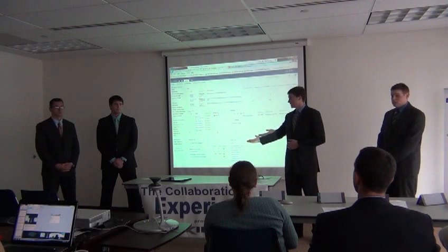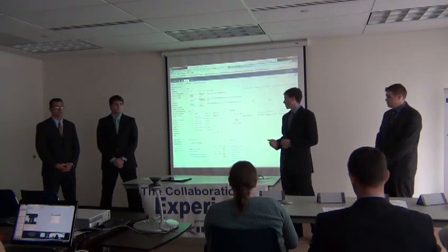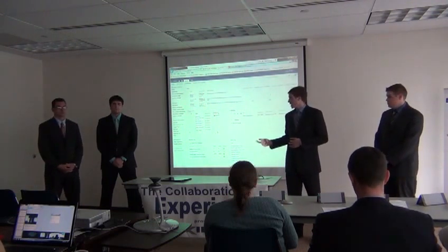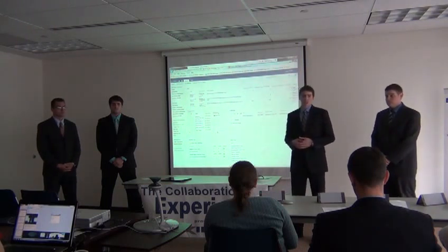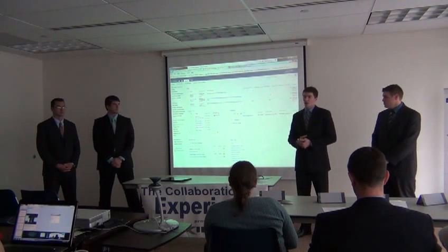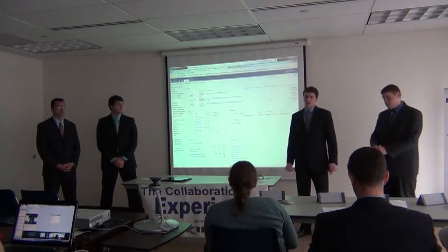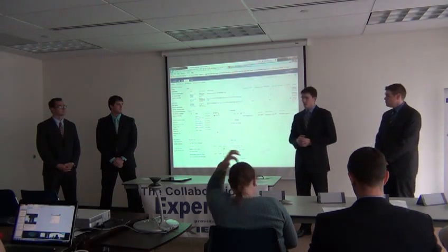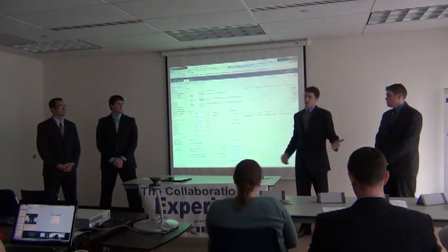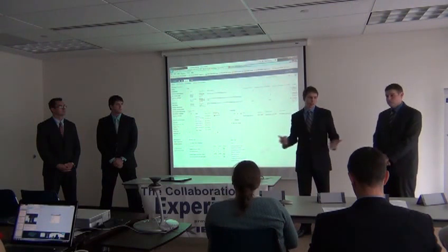The first three indicators we have are number of active tasks, unresolved issues, and overall completion status as a percentage. The three of these are important throughout the entire duration of a project. They can be monitored very easily with the dashboard setup and compared back to the project plan for any discrepancies you may have.